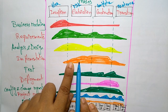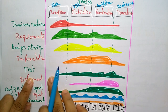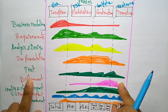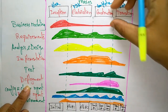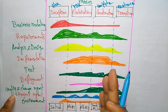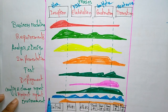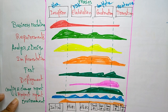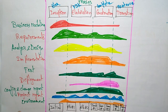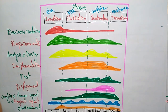Implementation starts at the second phase — Elaboration — and continues through Construction and Transition. Testing starts with the idea in Inception and continues up to Transition. Deployment occurs at the Construction and Transition stages. Configuration and change management occur from Elaboration through the maintenance phase. Project management is involved from Inception all the way through Transition, and the environment is established at the very beginning of the Inception phase.